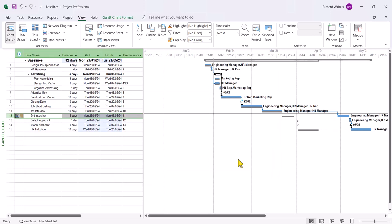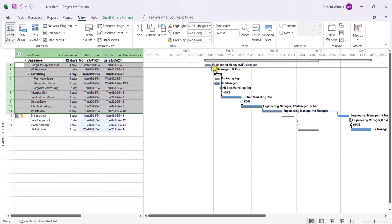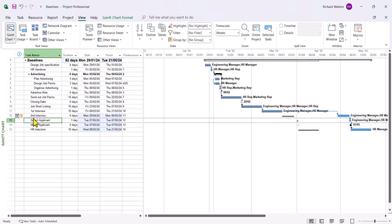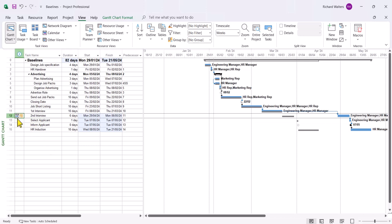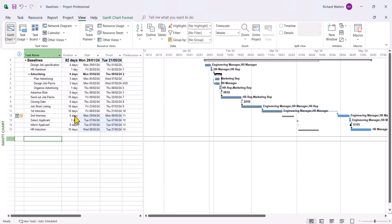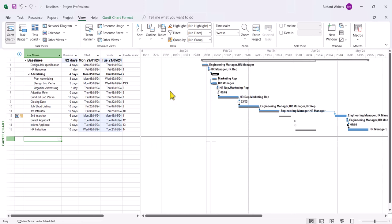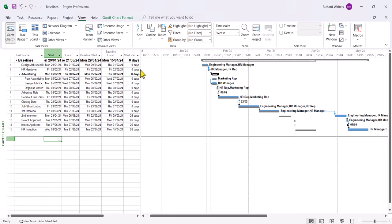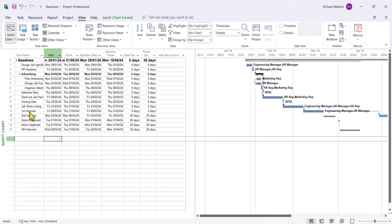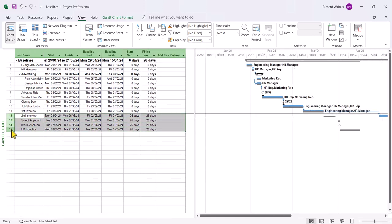And we can now see there's a clear, clear split between the blue and grey bars. So up until ID 11, the first interview, they're all joined together. Blue and grey are joined. But due to the constraint, we've now got a split. So in effect, the project now has been delayed from what was agreed. That's why the grey bars are behind the blue bars. And the constraint is very visual then. If you had a note, you could then see the note with it as well. If I went to the variance table now to check what happened with the variances, we can see now there's a 26 day variance. So if someone said, oh, how many days have you really delayed? We've now got quite a substantial delay. And we've got to try and make this back. The variance table gives you this information.